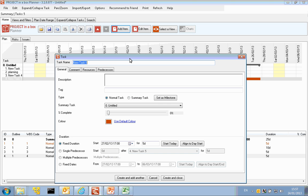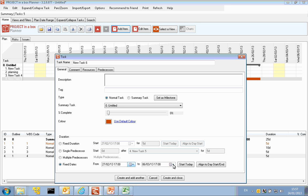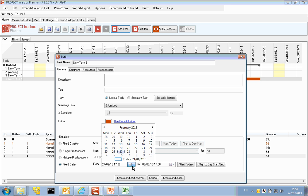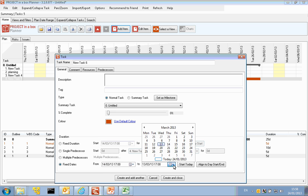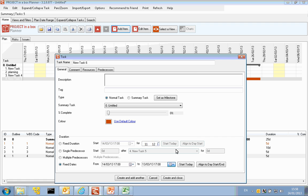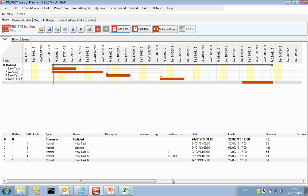So now my next task that I'm going to put in, I'm going to use the final type of duration, which is fixed dates. So this one, I pick the date it's going to start and pick the date it ends, and it will work out what the duration of days are in that. So let's come down here and look for some date in the future. So we'll go and pick a few weeks' time. Let's pick a date sometime after that. There we go. And create and close.